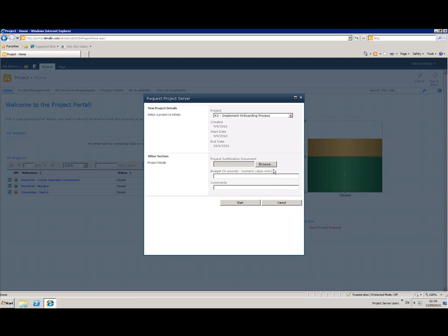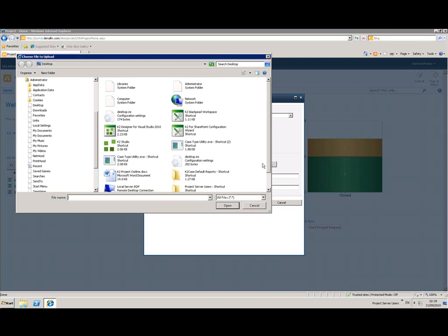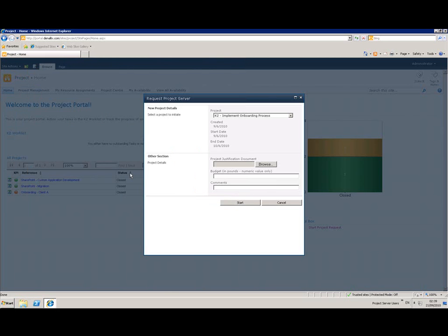So here I can now actually upload additional supporting documentation. Before we actually kick off the project, we want to ensure that, for example, there's budget, there's resources available, and we want to take it through approval before it actually gets initiated and we send consultants on site. So hopefully it's like that with most organizations where there's some level of control of sign-off for projects being undertaken. So I can say this is justification as to why we want to have the project.